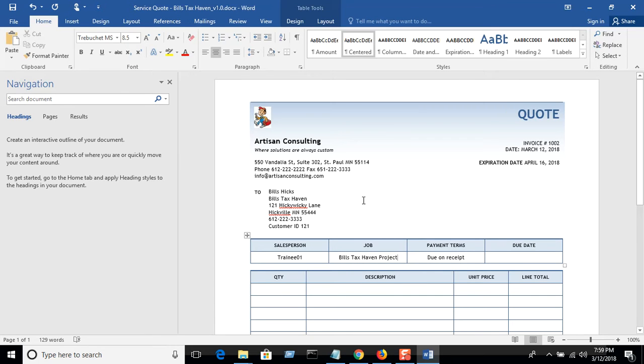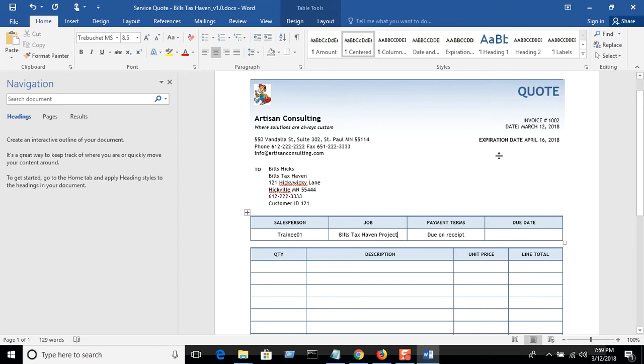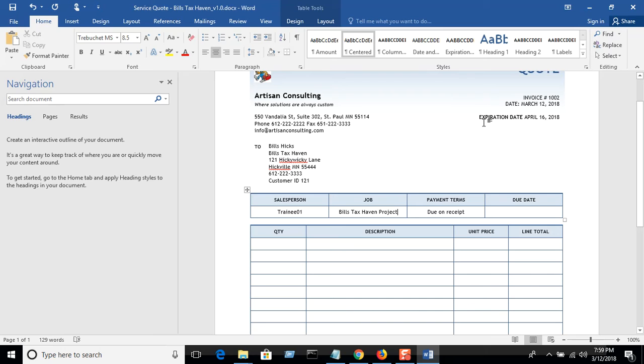Okay, so now this whole quote is basically just an estimate of what it's going to be to get this whole project done, right? So at this point we need to break down which things are one-time costs and which things are software, which things are hardware, which things are telecom, which is like circuits and things like that, and then also our time is an hourly rate.